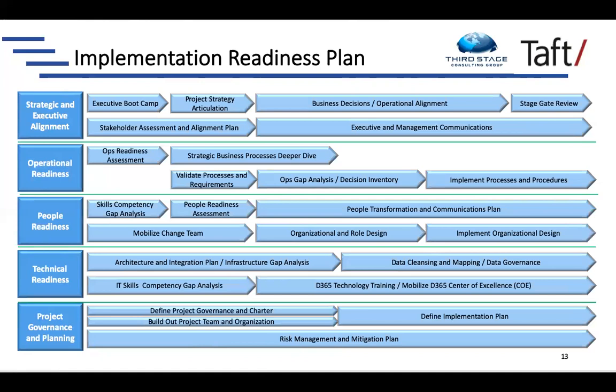The one thing I'll mention is kind of a context setting for when we're working with clients that are about to implement D365. Depending on the size of the company, this whole readiness phase could take anywhere from 2 to 6 months, roughly. For a smaller, more vanilla company with a more narrow scope, it might just be several weeks or a couple months of effort. For a larger global company that's deploying a pretty broad scope, going through pretty significant process changes along the way, this could be more like a several month time frame.